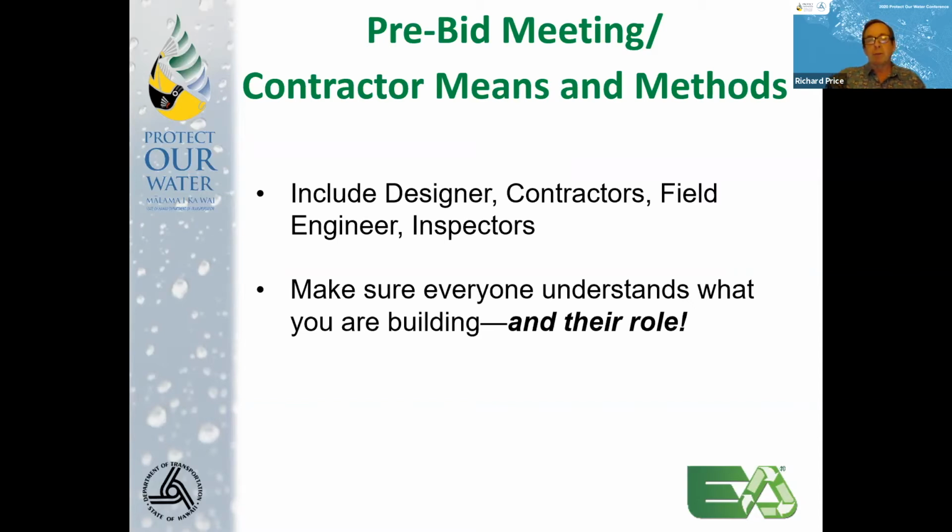contractor on a given project, so that they have a clear idea of what they should put in that erosion and sediment control bid line, and don't come back later asking for more money because they say they didn't understand it. It's a good opportunity to make sure everyone understands what it is that you're building and what their role is, not only on the construction side, but on the stormwater management side.